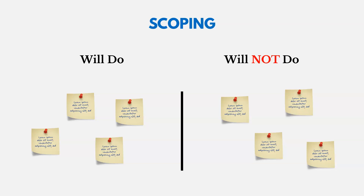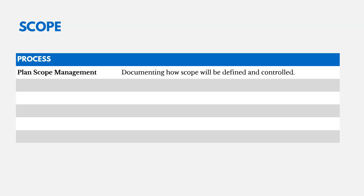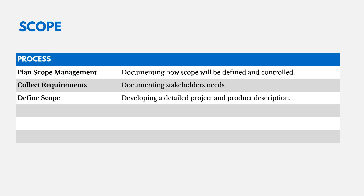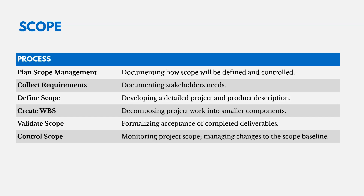The next knowledge area is scope management, where we define what the project will and won't do — setting boundaries. There are six processes: four in planning and two in monitoring and controlling. We plan scope management, collect requirements from stakeholders, define scope with a detailed project and product description, and create the WBS — the work breakdown structure, breaking the scope into smaller manageable pieces. Then we validate scope by seeking formal acceptance on completed deliverables, and control scope by monitoring and managing changes to the scope baseline.